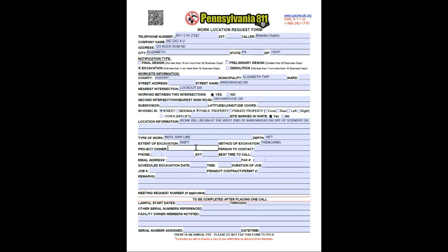All right, Erica, I'm going to stop you again there. Sorry about that. You said Elizabeth Township there. Kevin, why does it matter what you're doing as long as we give you the address? I already gave you the address. What does it matter what I'm doing here? Well, to make the job as safe as possible, I want to know what you're doing out there. I want to know, are you putting a mailbox in, or are you digging with a backhoe down 10 feet? If I own a sewer line out there, do I have to worry about it as much if you're pounding the mailbox in? Probably not. Obviously, I'm still marking it out, but I'm not as concerned that you're going to get anywhere near touching my line. Whereas if I find out you're digging 10 feet, the concern is there, and there's probably some conversations that we need to have to make sure everything's safe and ready to go for the project.